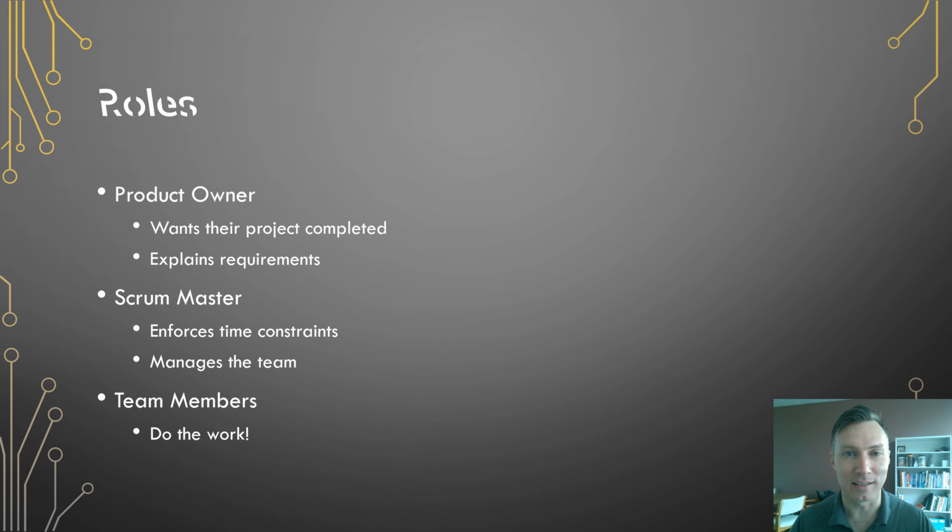The scrum master will ensure that the team meets the time constraints for the different phases of the project and ensure that team members have volunteered for all of the required jobs. Scrum Masters don't tell people how to do their jobs, only get people to volunteer on what to do. They'll work with the product owner to decide the order that the tasks will be completed in.